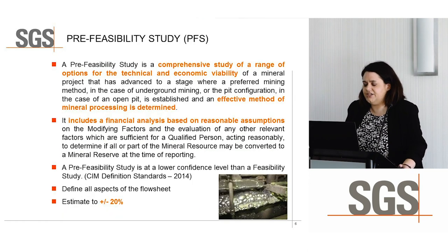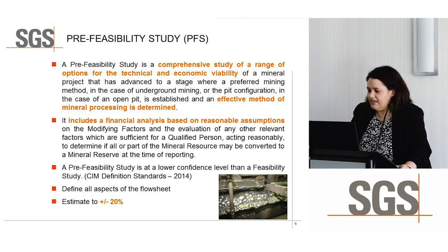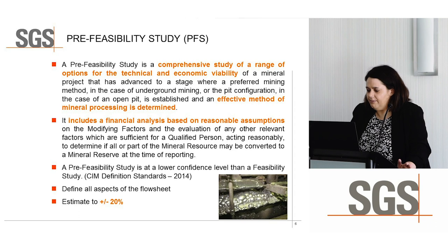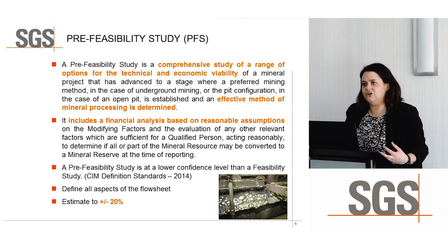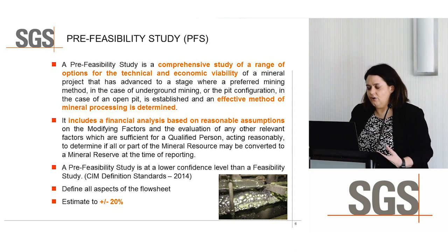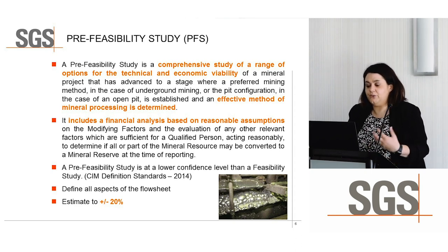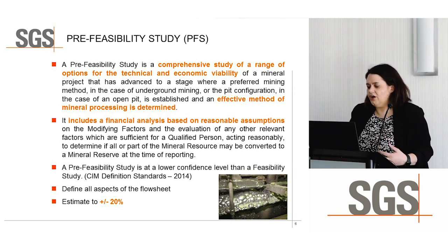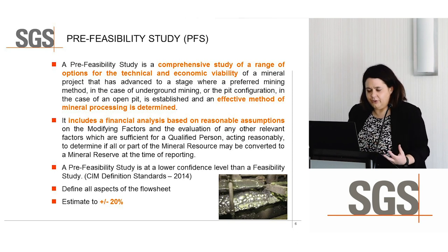So the next stage is the PFS, or the pre-feasibility study. This is where we're looking at the economic viability. And basically, we're now looking at the effective method of the mineral processing is determined. So what are we going to do to extract the metal or the mineral from that deposit? It has a lower confidence level than a feasibility study, but at this point, from a metallurgical perspective, we're actually defining the aspects of the flow sheet.